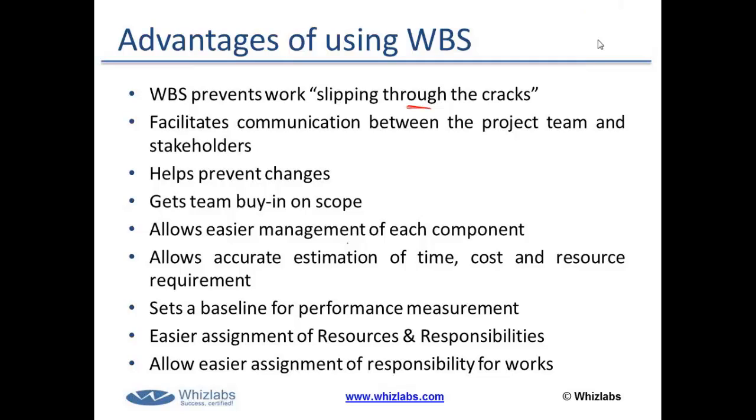See, two things here. There are various reasons for a scope change, Samir. Number one, a scope change can be triggered due to missed requirements. That is something we have taken care of with the help of requirement documentation. And let's say the scope is changing frequently because of customer requests, technological advancement, or the volatility of the environment in which we are doing the work.